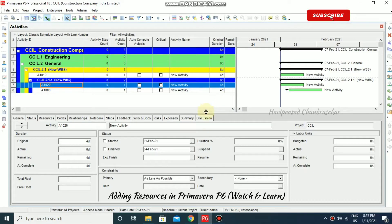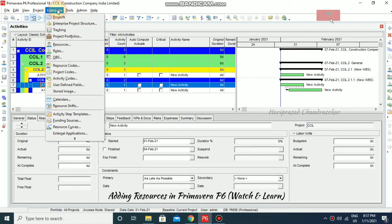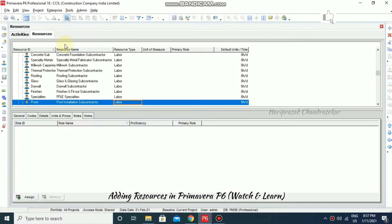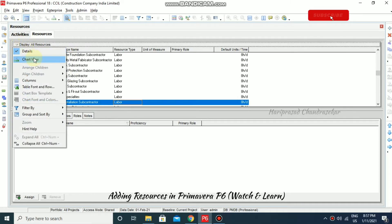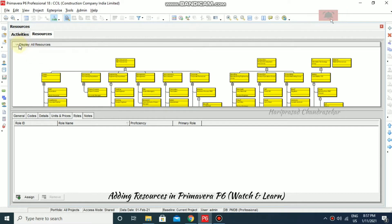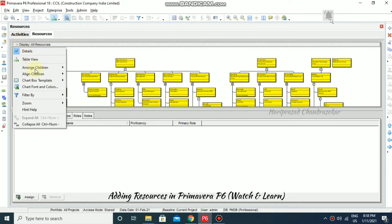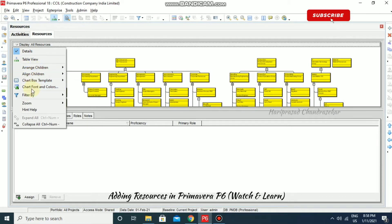In Primavera P6 we can also add other resources. For that we can go to Enterprise and then Resources. Once you go inside, we can display all resources and even go for a chart view. This is similar to the WBS and OBS that we already covered. I'm just going back to the normal view.